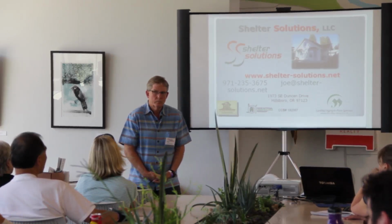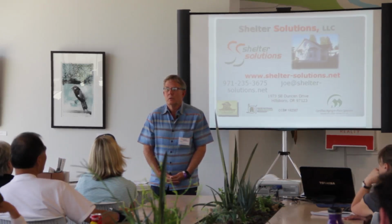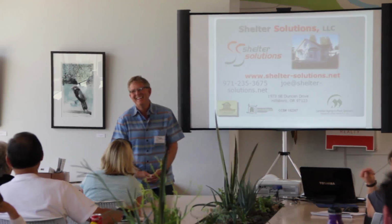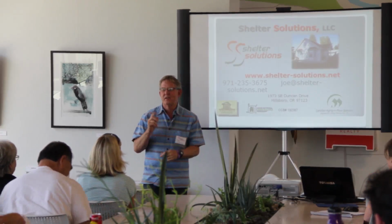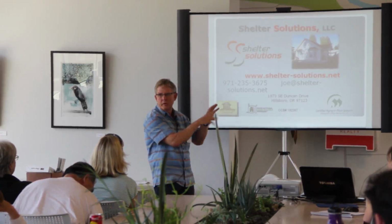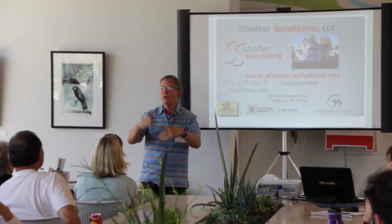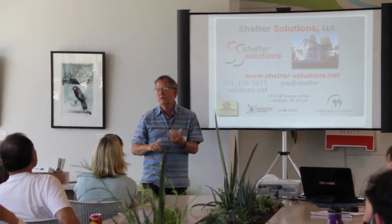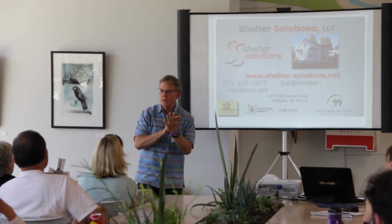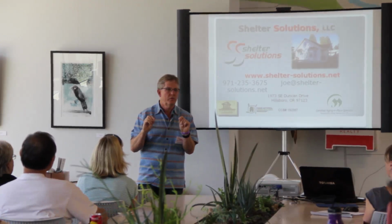Can you describe a little bit about how you get paid? How much do you put up front? As much as possible, as soon as possible. Typically, on my contract, we've done this cost estimate, we know what it is, say it's $100,000, and we walk through the design, all the specifications, we sign a building contract. I typically get a 15% deposit on the building contract. And then the remainder is divided into usually 4 payments at real specific stages of completion.